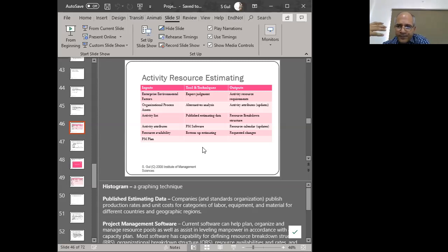But there are many things that we're doing for the first time. So in that case, we don't have a top-down estimate or a heuristic. You know? So in that case, we have to go through this decomposition, and then we estimate at the smallest level, and then add those estimates upward and say, well, overall, this is how long that particular activity would take, or this is how many resources we're going to require to perform this activity, and so forth. So if we're doing that, that is called bottom-up estimation.